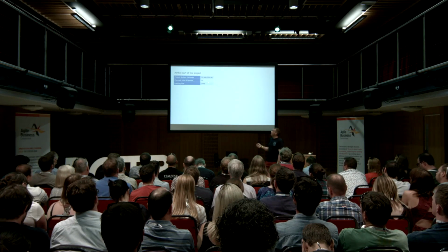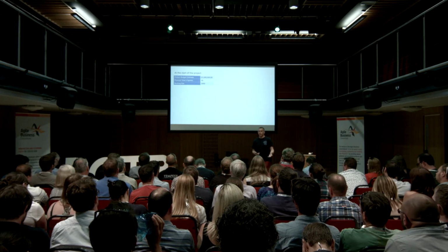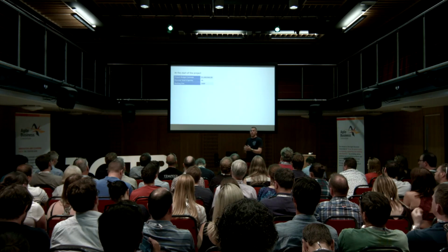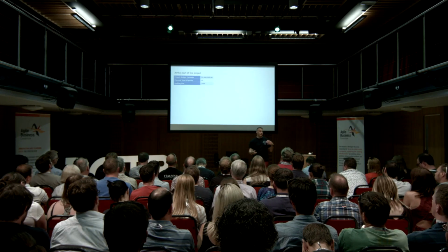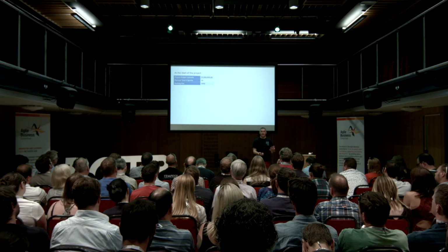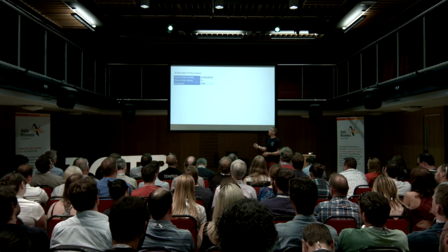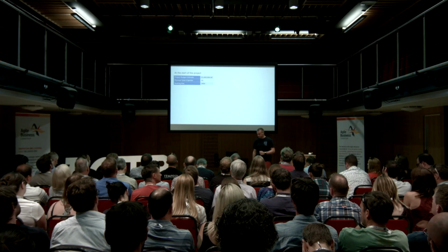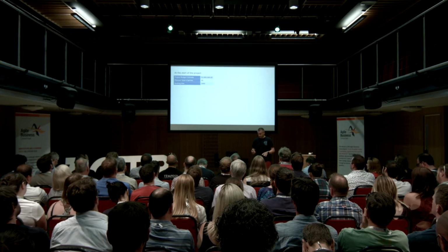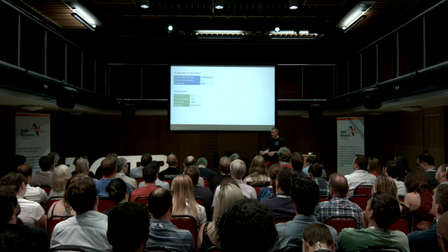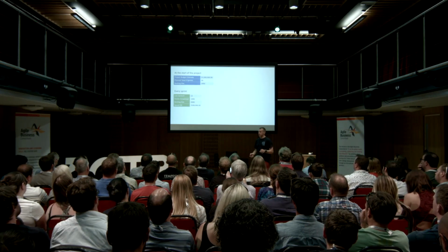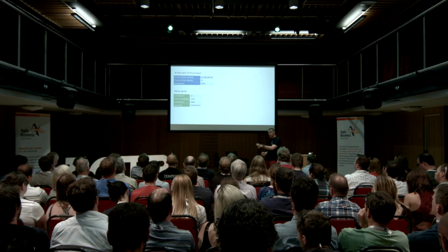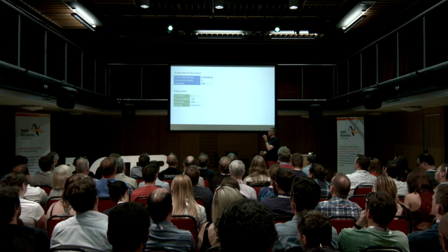You also need to estimate how many sprints you think you're going to take, so how long the project is going to be. When you know how many sprints you've got, you know how big your team's likely to be, so you can work out how much you're going to spend. So you end up with total cost, number of sprints, and total amount of work. You do that right at the start, and then every sprint you capture the current sprint you finished, the current number of points you finished, the current backlog size, and the total spend.